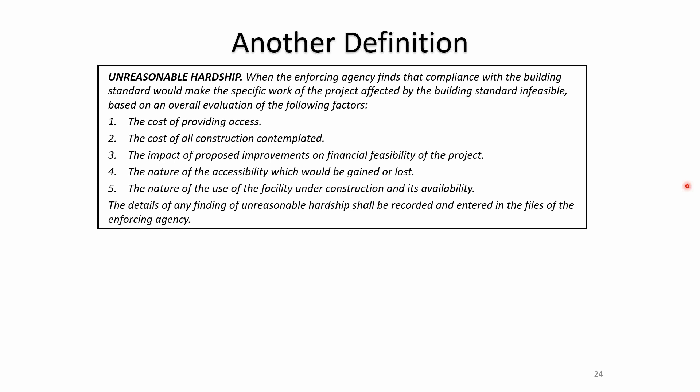Another definition is unreasonable hardship, word for word from the code. When the enforcing agency finds that compliance with the building standard would make the specific work of the project affected by the building standard infeasible, based on the following factors — the cost of providing access, cost of construction, impact of proposed improvements, the nature of the accessibility gained or lost, and the nature of the use of the facility — details of any finding of unreasonable hardship shall be recorded and entered in the files of the enforcing agency.